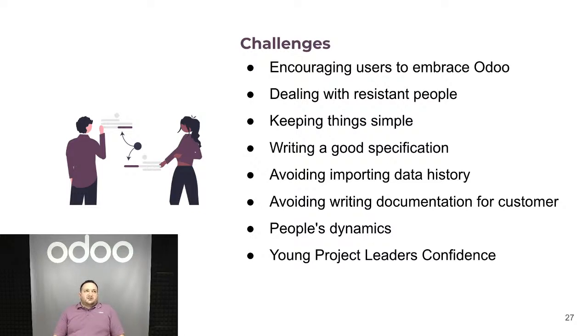But let's say it's an open invoice or an open sale order that they need when they switch to Odoo. So yeah, we will import that with the format that we provide to them. But again, we can also do that at a later stage. So if it's gonna hold us back from going live on time, we can push it to a later date.